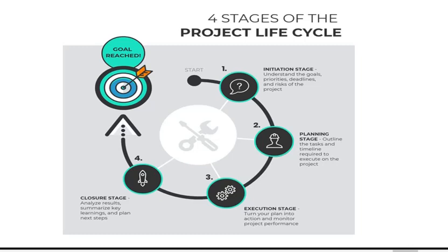The first course of action should always be to bring the project back on course, that is, to bring it to the original plan. If that cannot happen, the team should record variations from the original plan and record and publish the modifications to the plan.